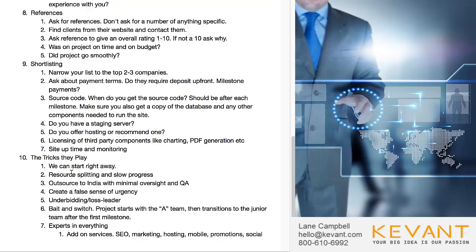The other thing that companies often do that is related to the first one is resource splitting, which means instead of having a developer dedicated to your project from start to finish, they will have a developer spend half their day on your project and half the day on another project, and so that allows them to move 2 projects forward, but the ramification for you is that you're going to get slower progress than you would if you had a full-time developer, or even 2 or 3 etc. developers working on your project.